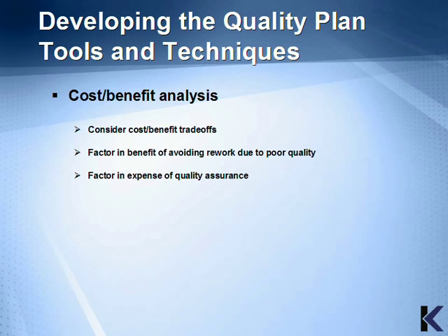If the project manager considered performing deliverables reviews at the end of each project phase to prevent defects from leaving one phase and going to another, the cost of the hours for the reviews might seem high. However, the cost of finding defects in the later phases and sending those deliverables back for rework would be much higher. Thus, in a cost-benefit analysis, the project manager would be able to prove that phase-end reviews of deliverables are a good quality measure to take and well worth the effort.